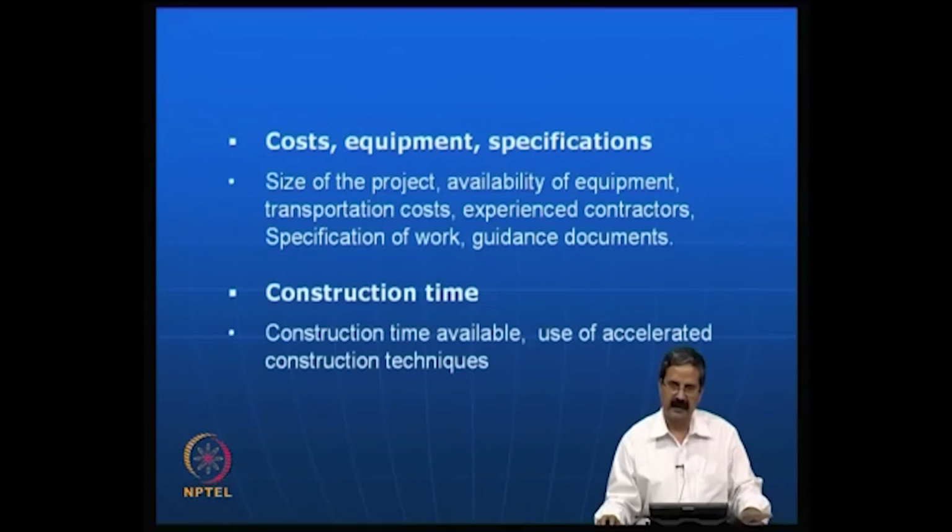You should give them the sequence of work right from the beginning, cleaning of the ground to complete erection of the ground, the complete work. Initially you have to clean the ground, then bring the equipment, then make some holes at a specified spacing. There are so many issues there, it is not easy. So, people should have the specifications properly written.